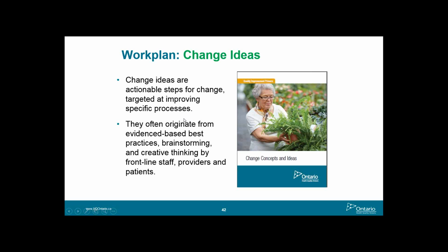And do you have a time frame, so that if you're going to post your work plan within your work area, and let's say the PSW is going to provide this information every Friday to the quality lead, they need to know what you're trying to measure. At a quick glance, they can look at it and say, okay, this is what we're going to do, this is how we're going to do it, who's going to collect it, how we're going to collect it, what we're actually collecting. And I know that it has to be done monthly or weekly, and that this phase will be over by February 1st, so they know what the time frame is for this activity.